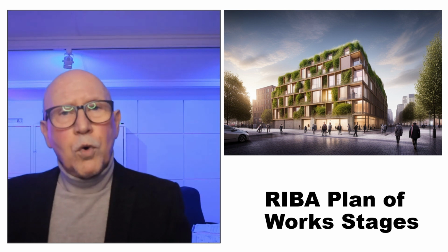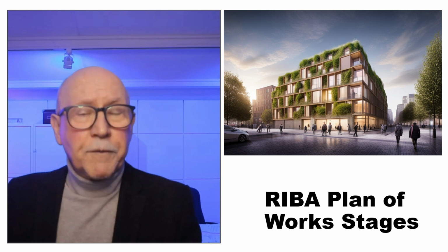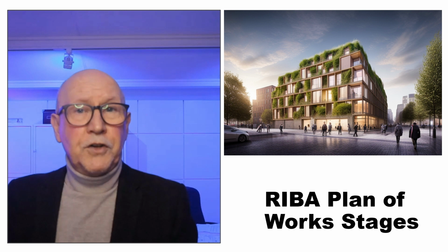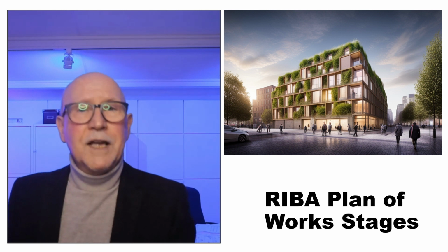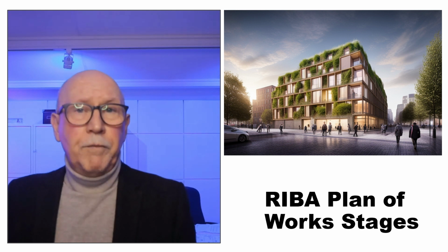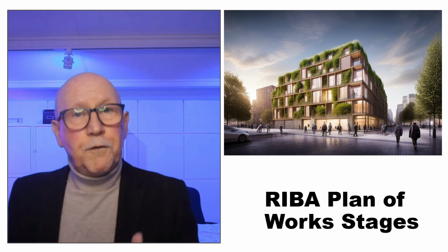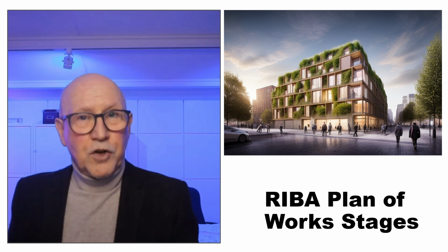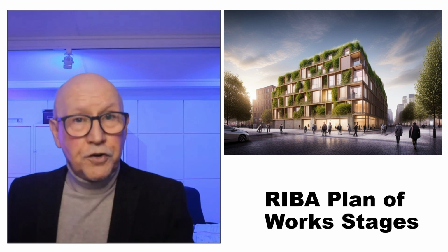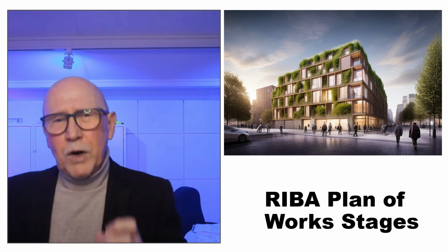Now, whilst work stage 7 deals with the building usage, the main event for the architect is arriving at work stage 6 as handover. This is the point where you are signing off the building with your final certificate as being fit for occupation, and confirming also that the building fulfills your design intention and specification. So you can see why it's important.